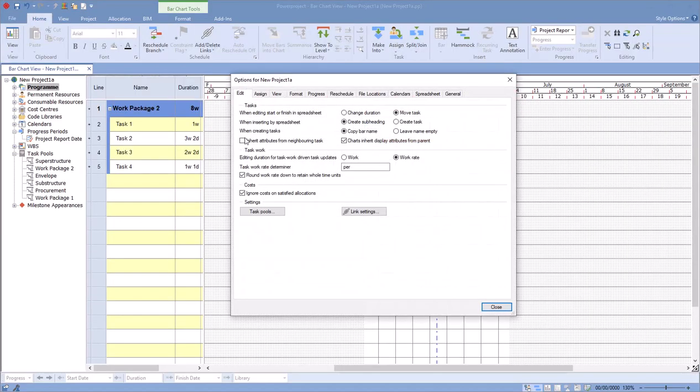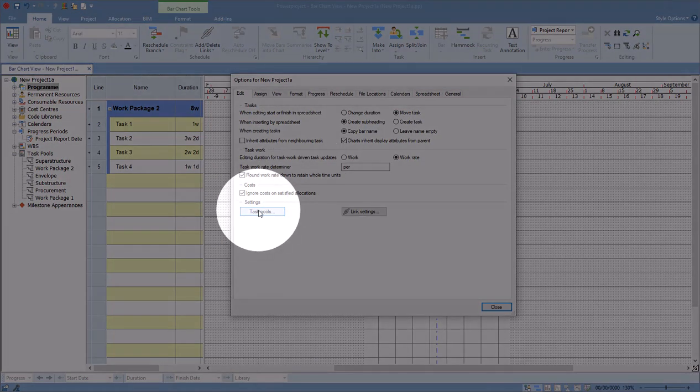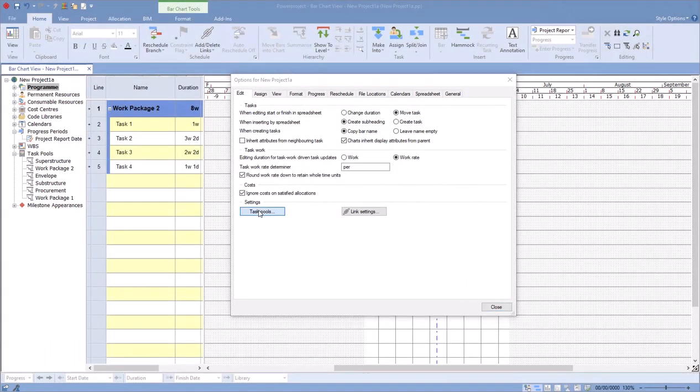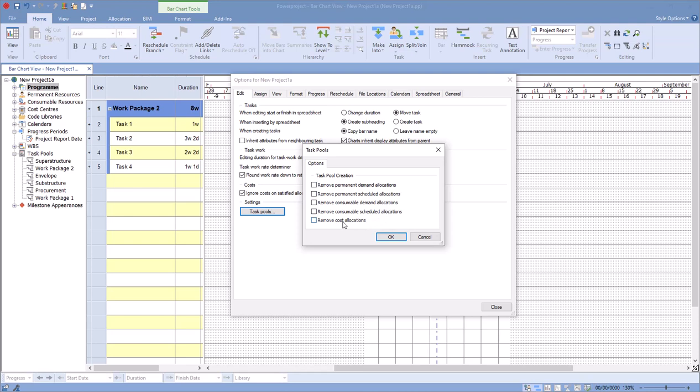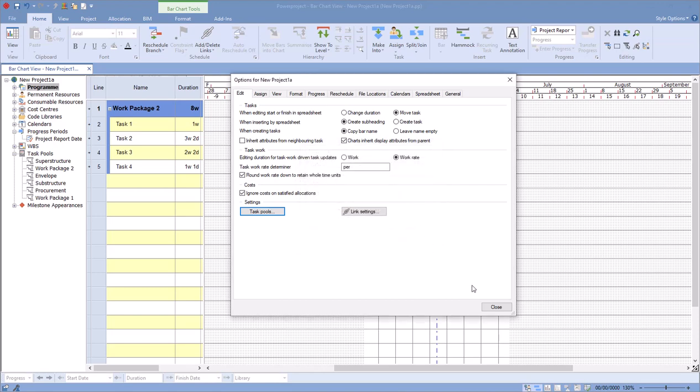And under the Edit button, just go to the Task Pool Settings. I can decide when I create a task pool where it removes demand resources, scheduled resources, consumable resources, and costs. So if I had all of those ticked, it would strip all resources and costings off the tasks when it assigns it. Automatically will always remove the progress, but it will maintain the tasks, the links as well inside there, in code libraries and so forth.